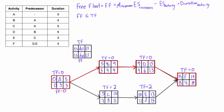For activity B, whose only successor is D: early start of D minus early start of B minus duration of B gives 9 minus 5 minus 4, which is zero. For activity D, the minimum early start of its only successor is 15, so 15 minus 9 minus 6 gives zero. Activity F has no successors, but since its total float is zero, its free float must also be zero.